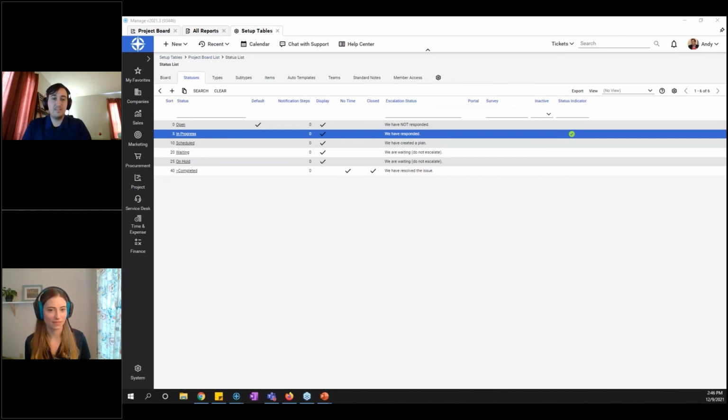Yeah, I think if your focus is on billing your customer, I could see where someone would assume that wasn't necessary. But when you start running reports to pick out your gross margin, or maybe decide if you need to increase your rates on projects, it's really difficult to make that call without seeing how much you're spending on this project. And yes, that time will be tracked against the project budget.